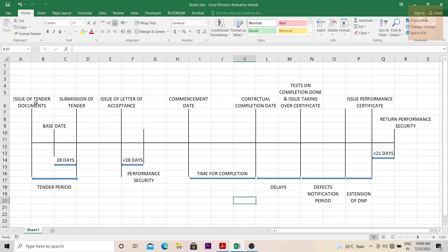Once the tender documents are issued, the tender period begins. The date on which the quote needs to be submitted by the contractors to the employer. So that is called the tender period. 28 days before the submission of this tender is called the base date.